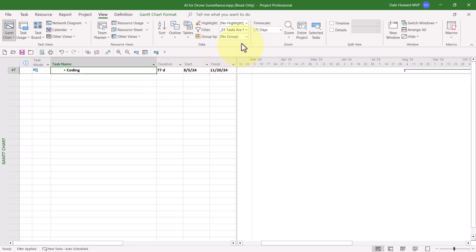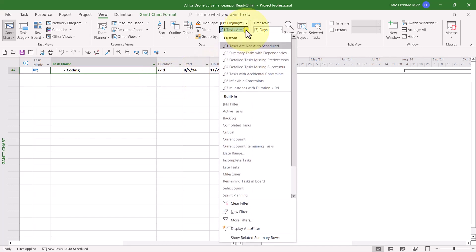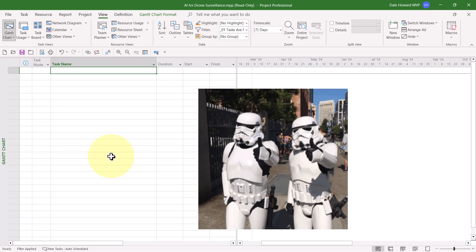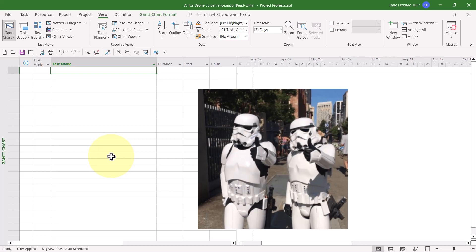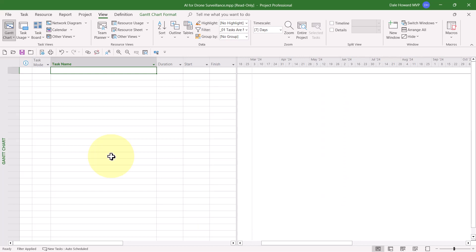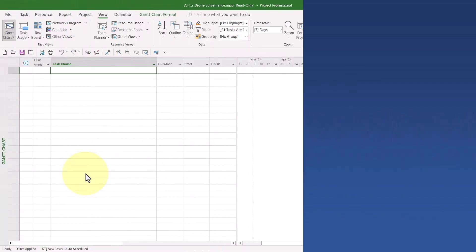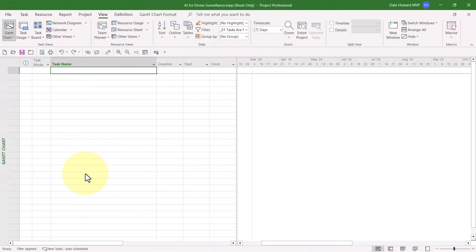Then I recommend you reapply the filter to make sure you don't have any residual problems. If you return a blank task list when you apply the filter, woo-hoo, that's good news. That means there's no tasks that have that particular problem.